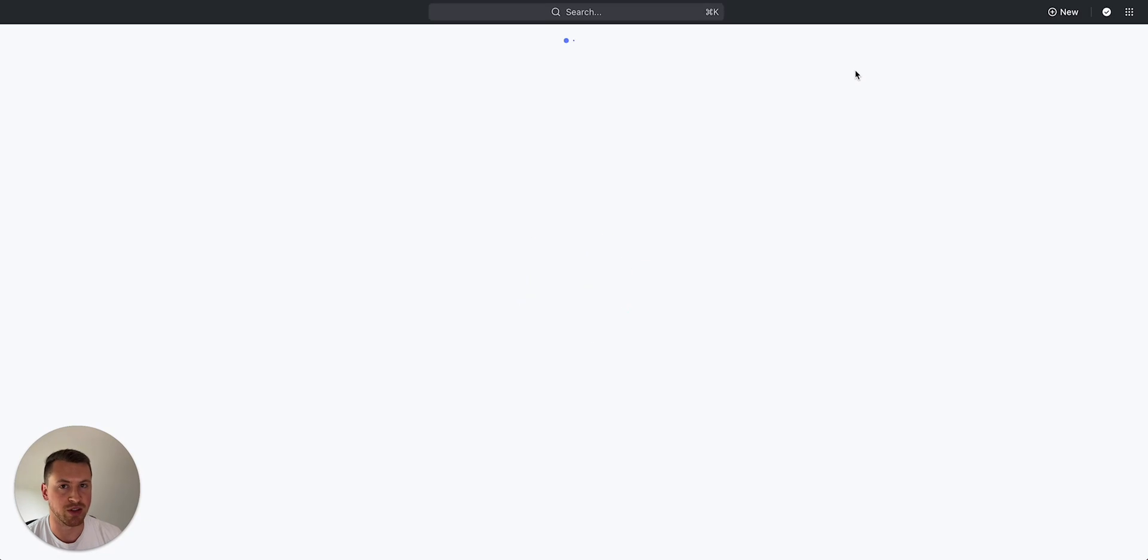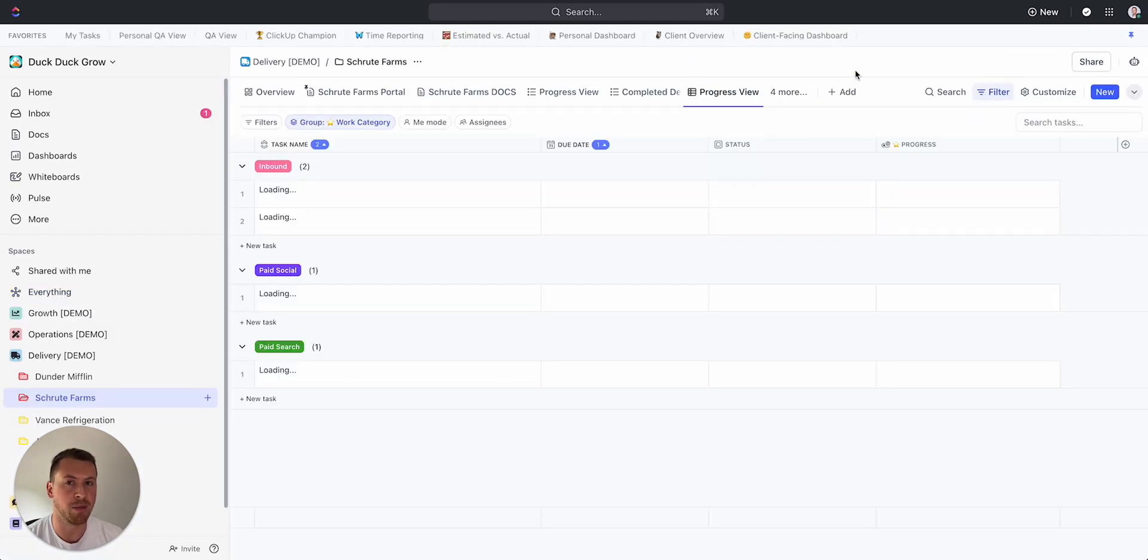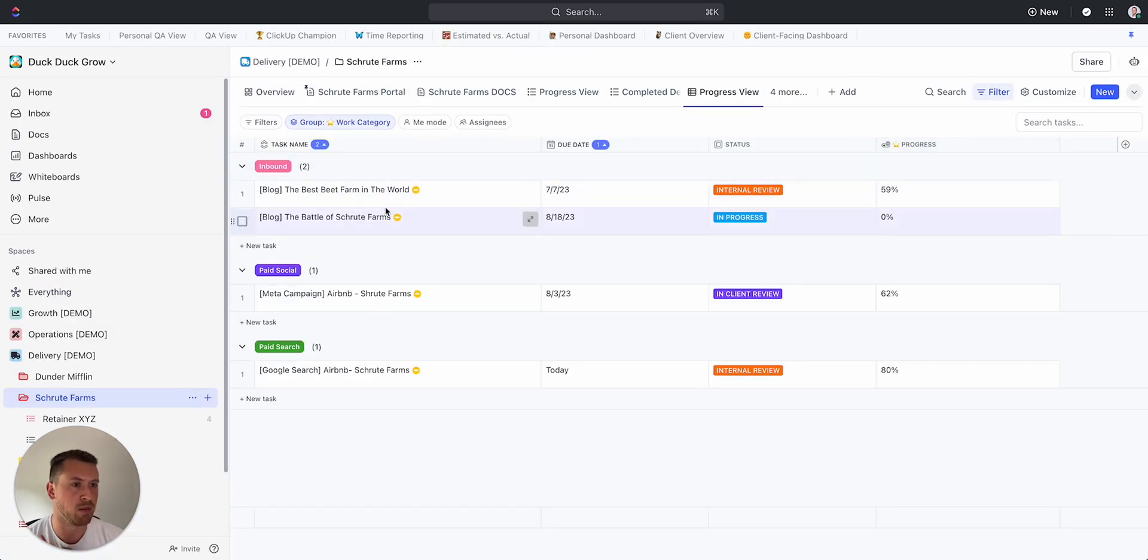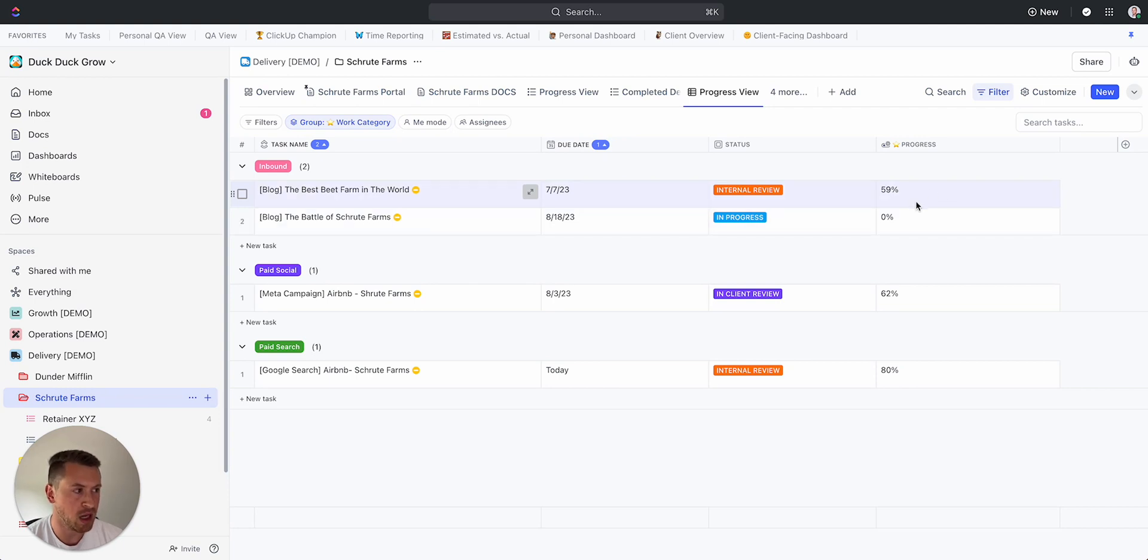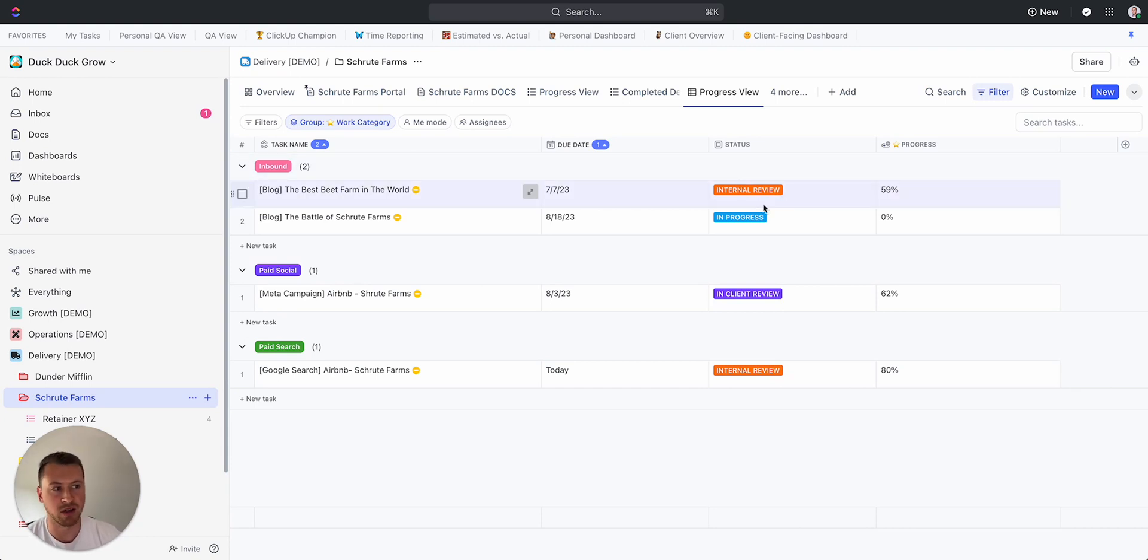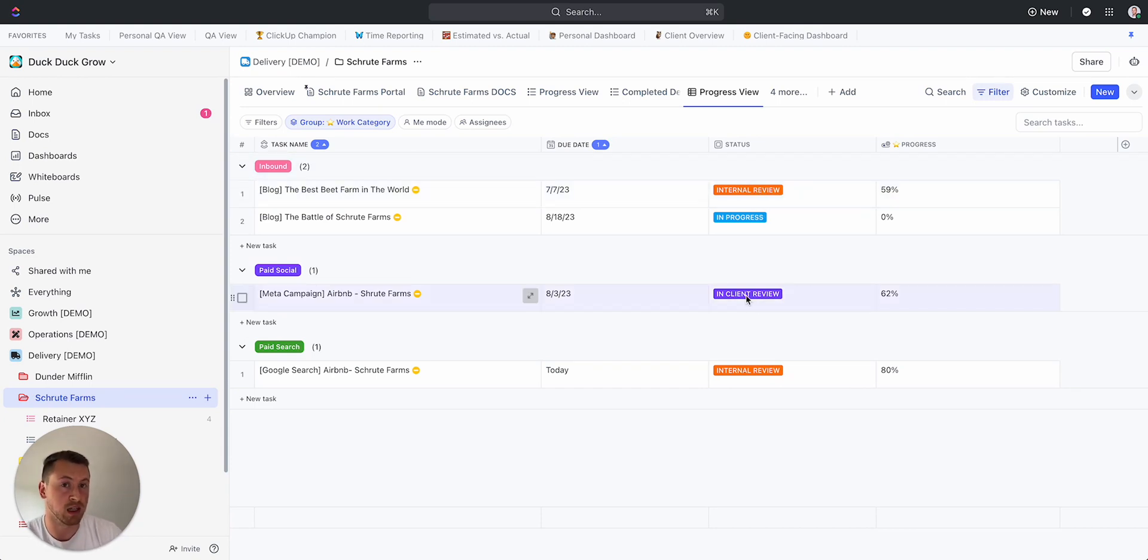In Progress, what it's going to do is that's going to just automatically update based off of my subtasks. So as I close out more subtasks in this blog post, it's going to show me that I'm 59% of the way done with this. So if your client needs to see that, that's helpful. And then also this is going to be the status of the parent task.